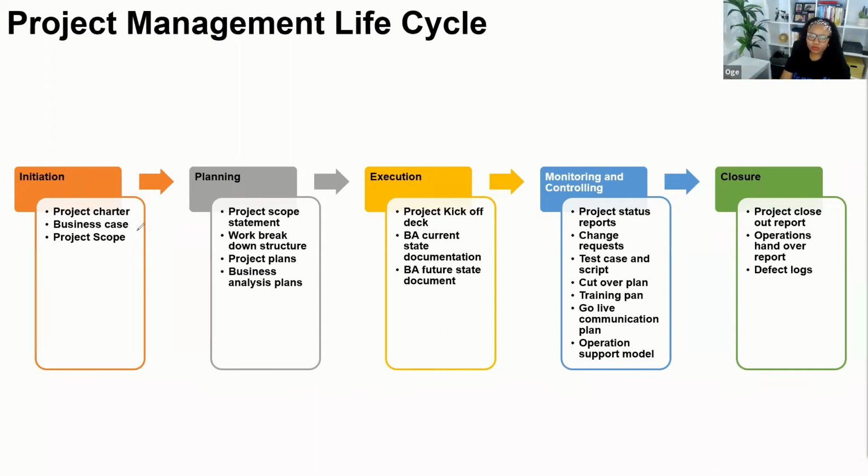your stakeholder plan. A business analyst does not work in isolation. If you are working on a project and you have a project plan, you must make sure that your BA plan aligns with your project plan. You look at the project plan, that's the project manager's document, to come up with your plan, because the timing and everything is governed by the PM's plan. Your project management plan cannot be north and your BA plan south. So you need to make sure it aligns, and you also collaborate with your PM. So we would have a business analysis elicitation plan.